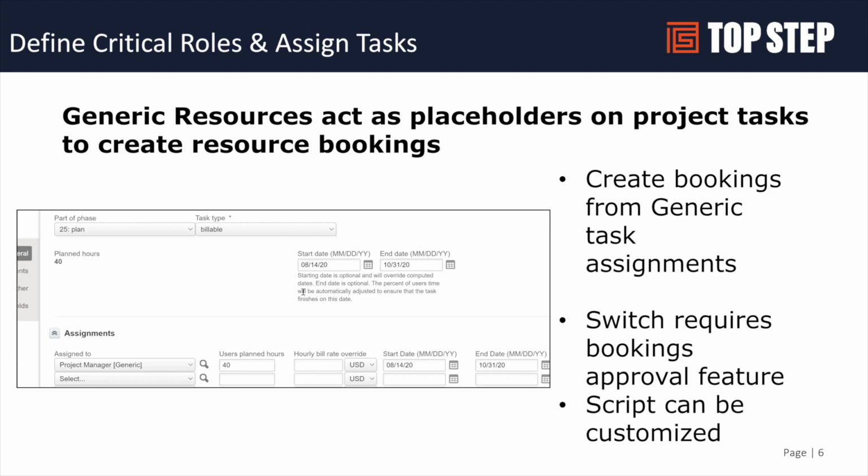The project manager gets assigned to the project, starts to engage with the customer, and starts to update the project plan: what are my start and end dates for the different tasks and assignments, the types of resources I'm going to need for a particular project, validating that the template structure doesn't need to be modified, and also validating the hours inside the project plan are valid based on what's being communicated with the customer and what's in the statement of work.